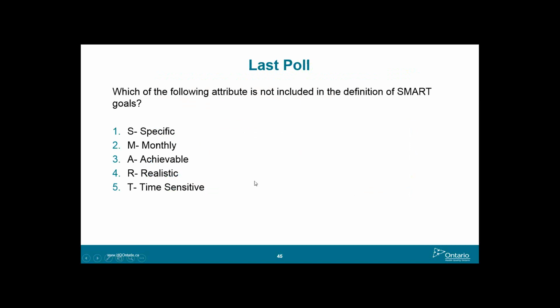What we want to see is that each change idea has a different change number. Because all of this will be preloaded into your future year's progress report, for clarity, you just put one change idea per pop-up box. So for example, let's say we know from last year a significant proportion of the people using the ED for low acuity visits are those with COPD. One change idea could be to ensure nursing supports for COPD are provided at a reasonable interval. So that's one change idea.